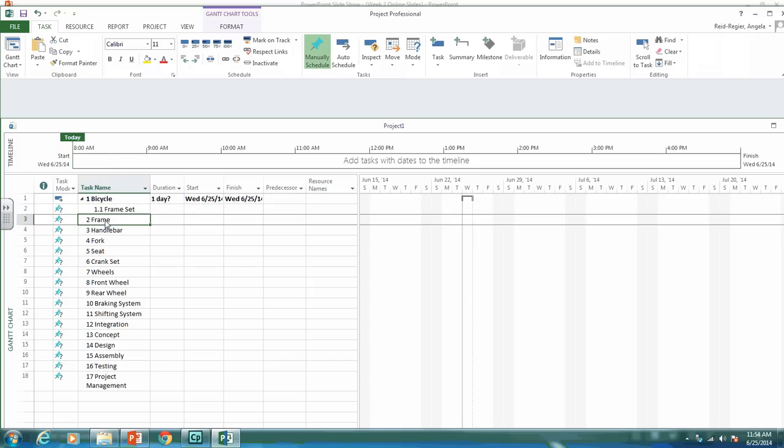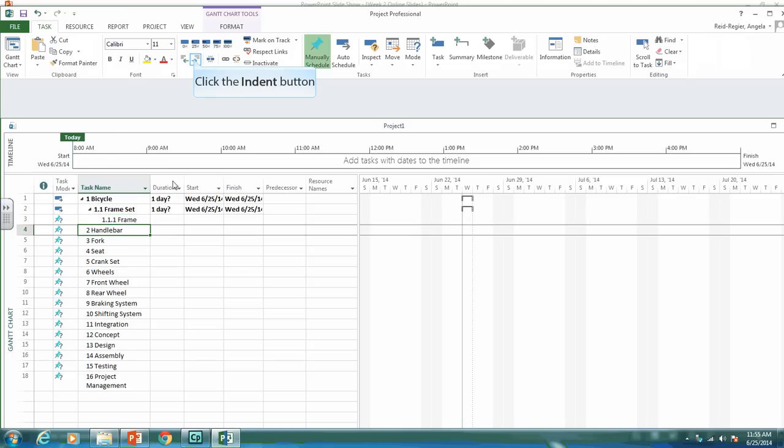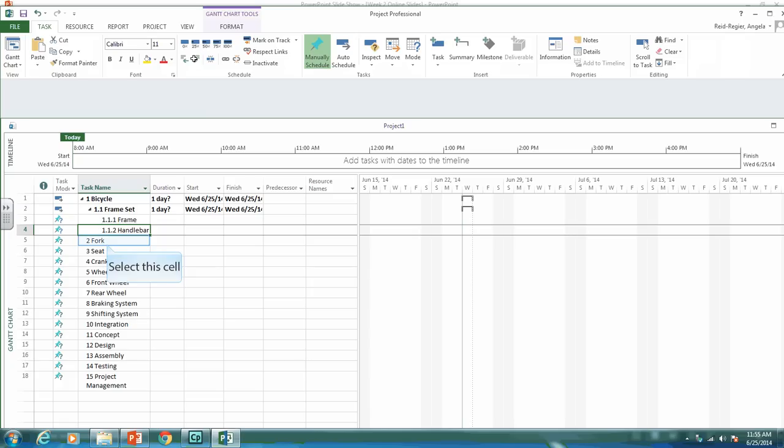Now the frame comes under the frame set, and we want it as 1.1.1. So we need to indent it twice to get it as 1.1.1. Handlebar as well comes under the frame set, so we want to indent it twice.